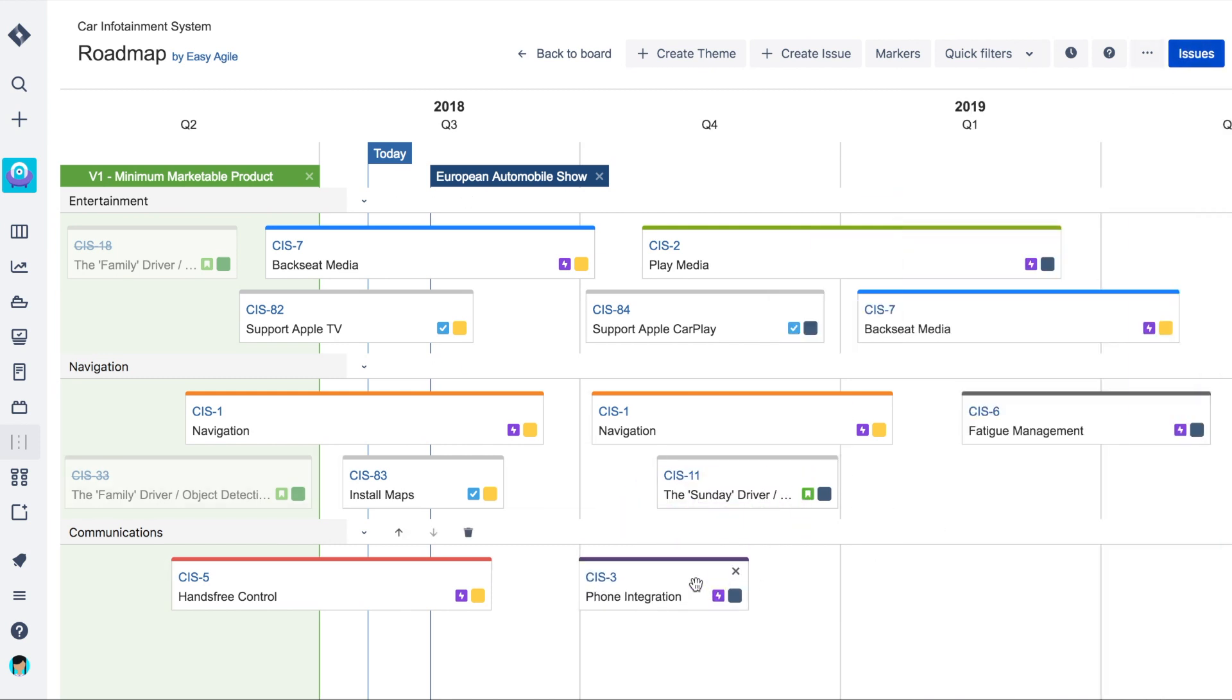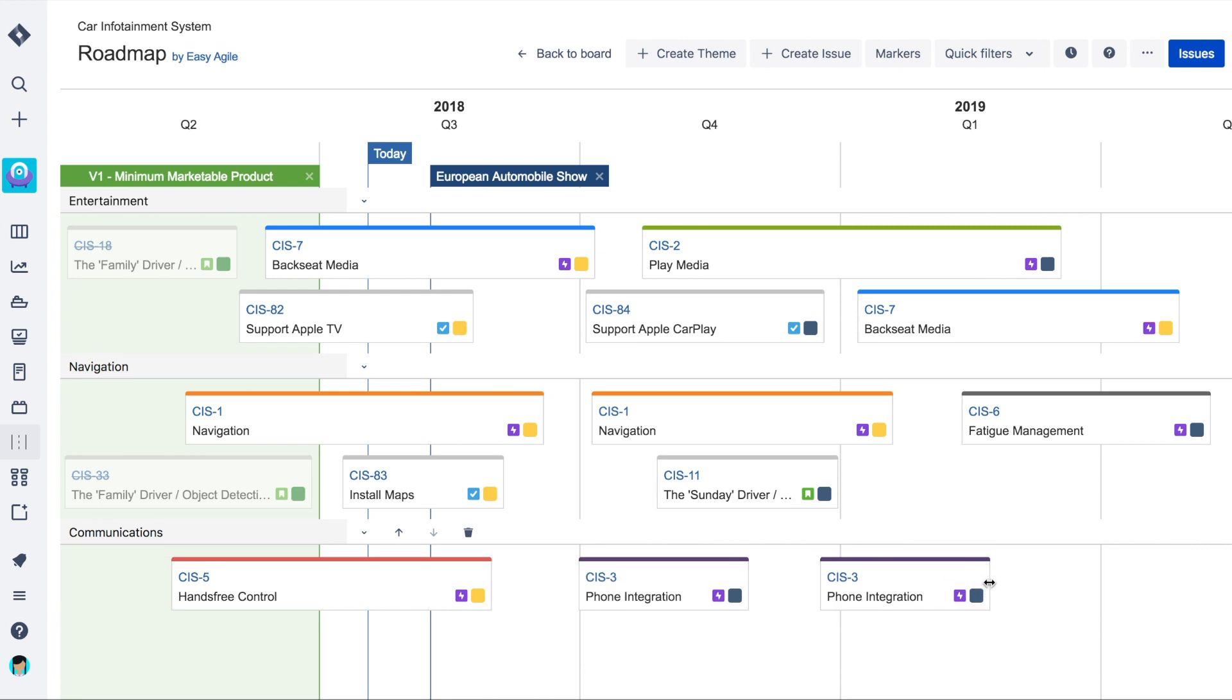A single issue, like an epic, can be scheduled multiple times on the roadmap to reflect the way teams really work on large chunks of work.